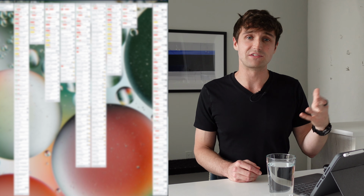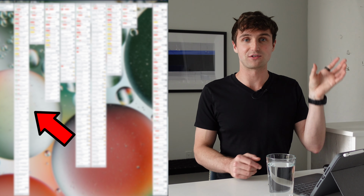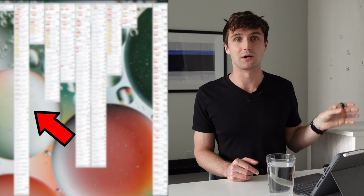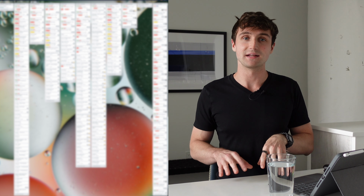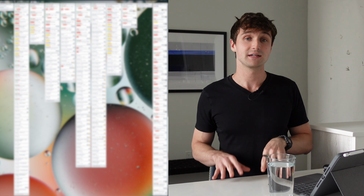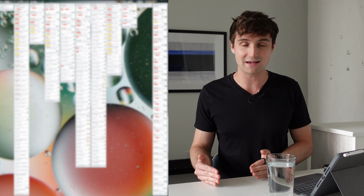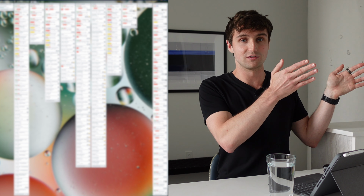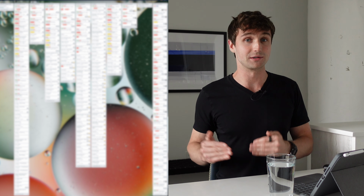The other bottleneck, if you will, is the work backlog. So when cards get entered into the system, they first go into this column. The issue is that this column is getting longer and longer and longer, faster than we can start moving cards through the system. Now the issue here, the bottleneck, is a capacity problem. So what we're doing to increase the capacity of our system is to hire more people who can move these cards more effectively through the system. That way, the backlog is no longer a bottleneck.